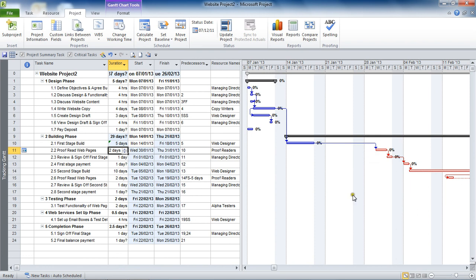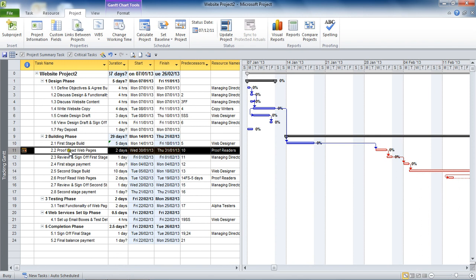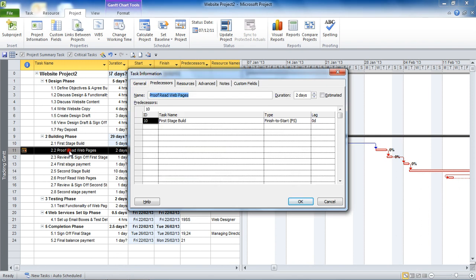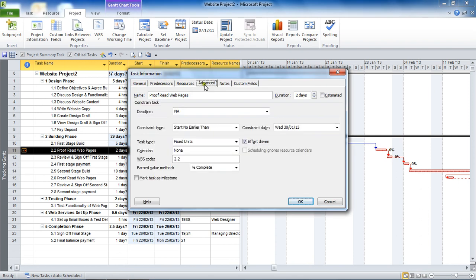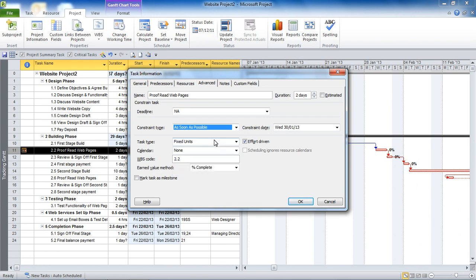But in this case, that's what we've got with a constraint. Let's look at removing that constraint if I don't want it anymore, or maybe creating another type of constraint rather than changing the date. To do it, I'm going to double-click on proofread web pages to open up the task information dialog box. I'm going to go to the advanced tab, and we've got this constraint type list halfway down, which I can change to as soon as possible, which would remove that constraint.